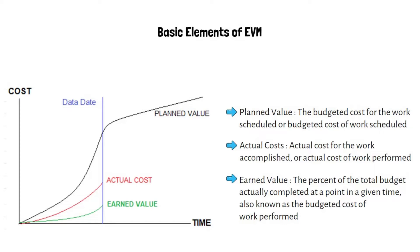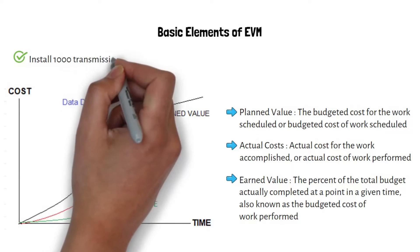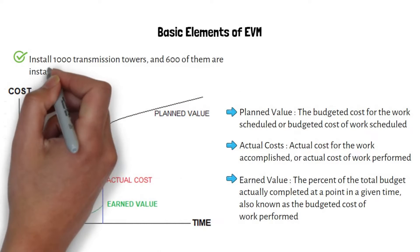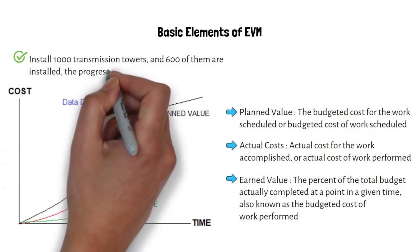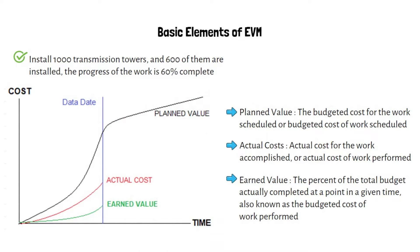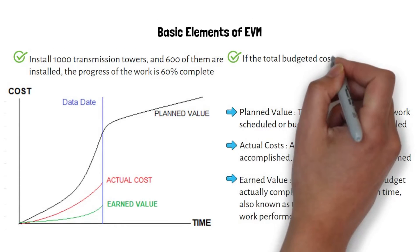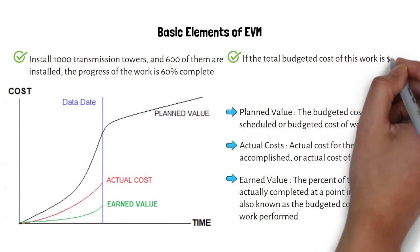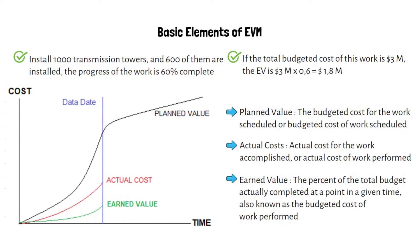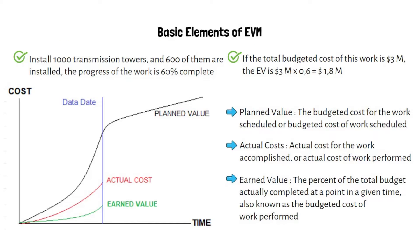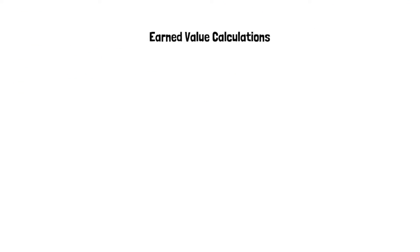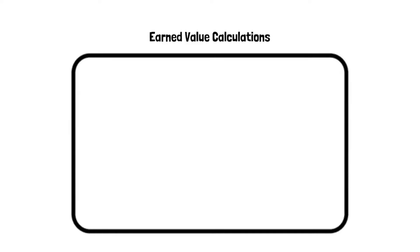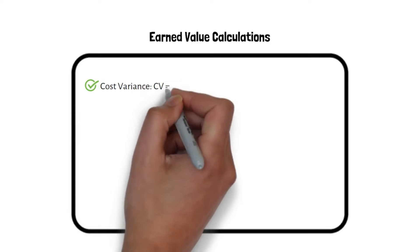For example, if the total scope of work is to install 1,000 transmission towers and 600 of them are installed, the progress of the work is 60% complete. If the total budgeted cost of this work is 3 million dollars, the Earned Value is 3 million dollars multiplied by 0.6, which equals 1.8 million dollars.